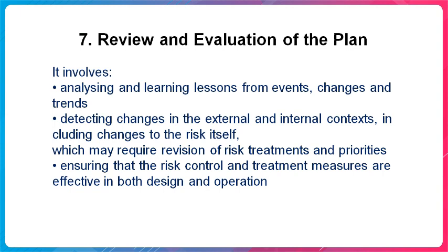Risk analysis results and the management plan should be updated periodically. There are 2 primary reasons for this. Number 1, to evaluate whether the previously selected security controls are still applicable and effective. And number 2, to evaluate the possible risk level changes in the business environment. For example, information risk is a good example of a rapidly changing business environment.